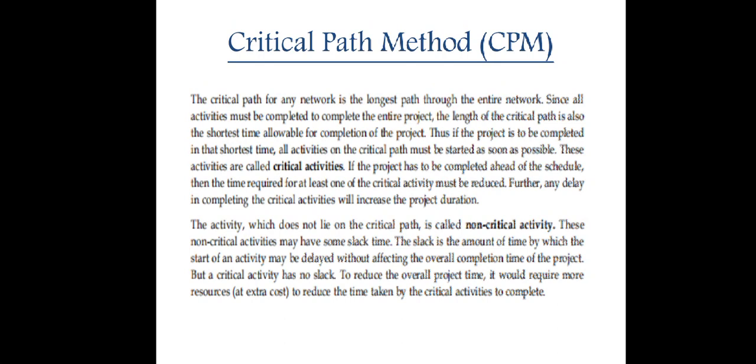If the project has to be completed ahead of schedule, then the time required for at least one of the critical activities must be reduced. Further, any delay in completing the critical activities will increase the project duration. An activity which does not lie on the critical path is called a non-critical activity. These non-critical activities may have some slack time.